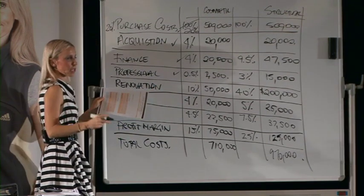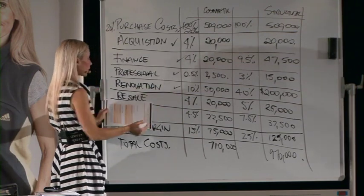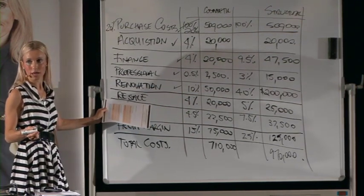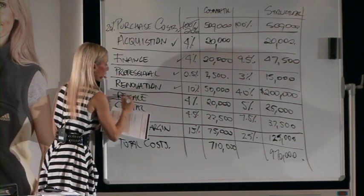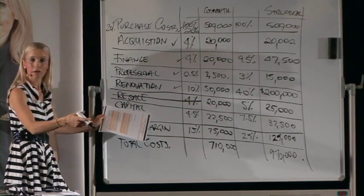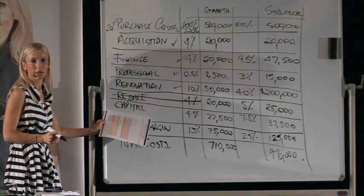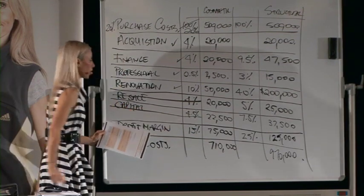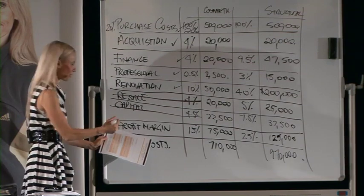Your renovation costs — the actual money to fund the reno — coming out during the project. Now, your resale costs — your agent's commission and marketing fees — are they a cost that comes out during or after? After. So you don't have to worry about that one, because you can pay those agent's commissions and marketing when the property settles on payday. Your capital gains tax — during or after? After. So you don't have to worry about that either. Your profit margin — during or after? After. You're the last one to be paid in the deal.